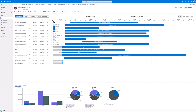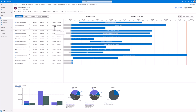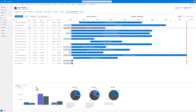It is also possible to select the ETC and the accumulated ETC. This provides information on how much a specific project is going to cost within the current scenario. Now I can exclude specific projects from my scenario and then see the effect on estimated cost within the current year, because the project will either be paused or terminated. And it also sums up the main drivers that we have for our scenario.